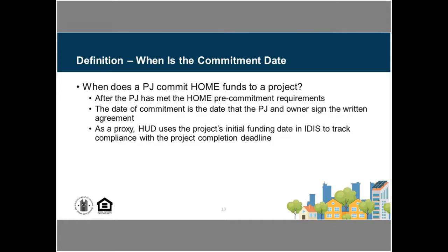And so, recognize there could be a little difference between that depending on how your internal process works, from the point that you have a fully executed written agreement, how long does it take you to get that project set up within IDIS? Obviously, we'd like them to be very close, but compliance will be based on the written agreement execution date versus what's in IDIS.